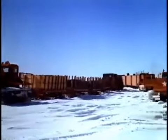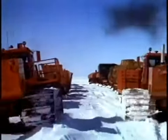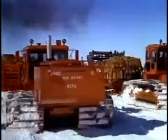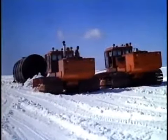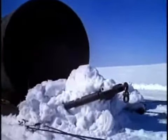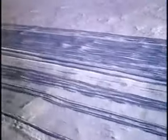By early July, most of the heavy construction work on the tunnels was completed. Throughout this operation, it was a steady stream of heavy swings moving back and forth across the ice, more than any other single factor, that made it possible for us to complete Camp Century on schedule. 25,000 gallons of diesel fuel, 110 tons, an all-time record sled load. The continuous flow of tractor trains bringing in enormous cargoes were like the dependable tortoise, slow but steady. But they were our lifeline.